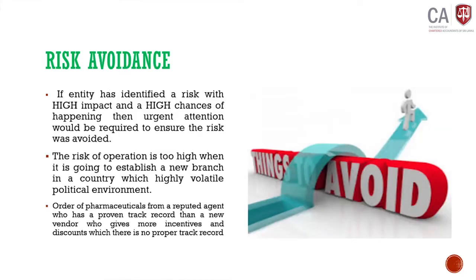Next one, risk avoidance. If it is not worthwhile to take the risk, then you should avoid it. If an entity has identified a risk with high impact, that means high severity and high chances of happening, urgent attention would be required to ensure the risk is avoided.